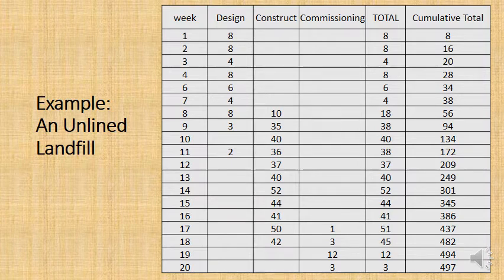And normally the definition and planning stages take a long time, but expenditure isn't that much because there's no specialist equipment being used. The project team is quite small at this stage, and so the expenditure is down too. And with design work, usually the expenditure is not as much on a weekly basis as it is with construction. So let's now put that cumulative total on a line graph.